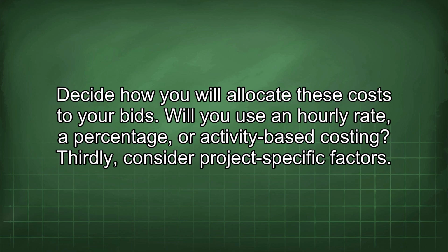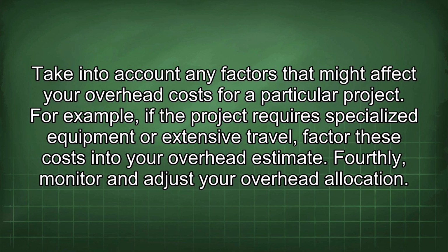Thirdly, consider project-specific factors. Take into account any factors that might affect your overhead costs for a particular project. For example, if the project requires specialized equipment or extensive travel, factor these costs into your overhead estimate.